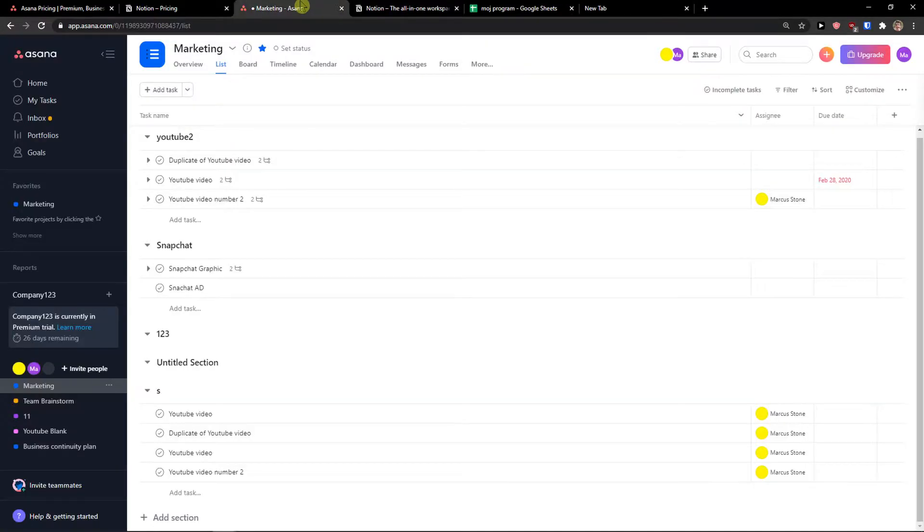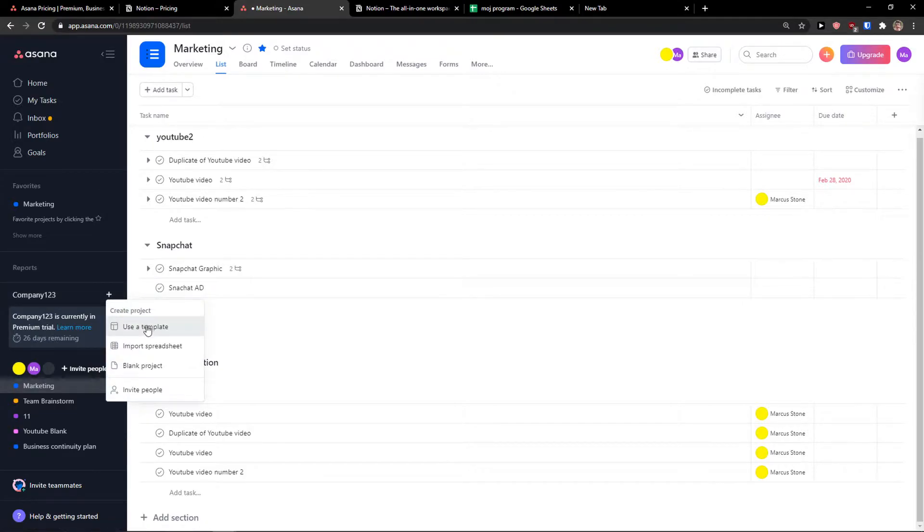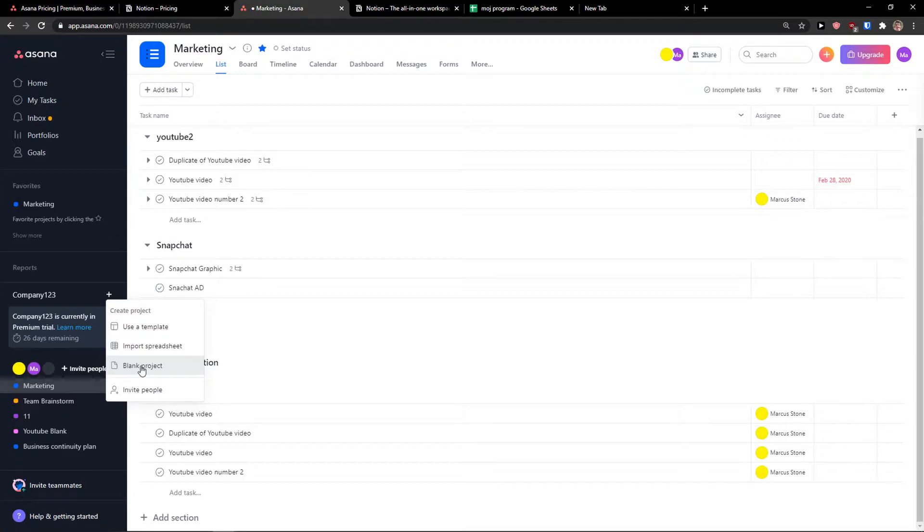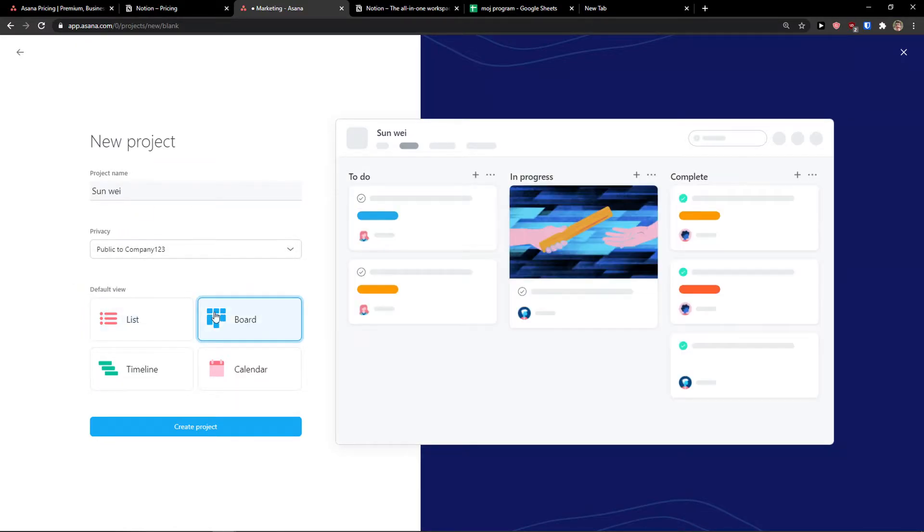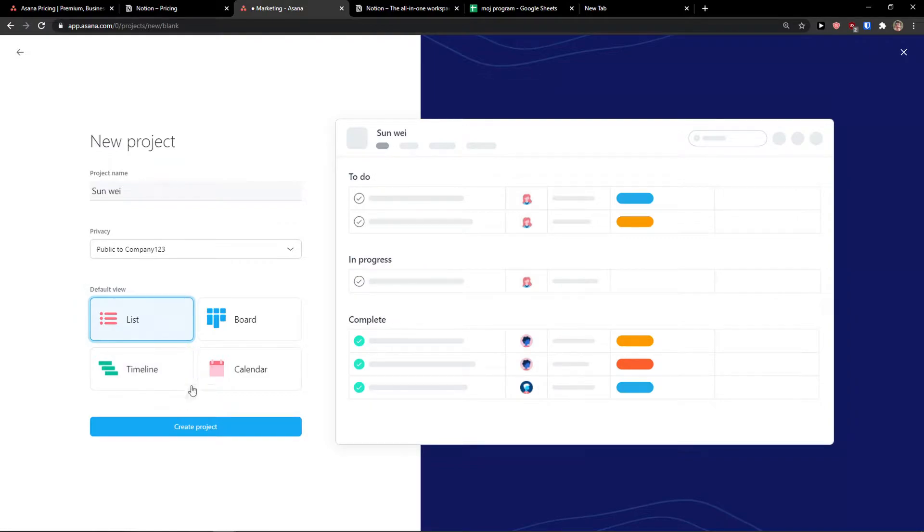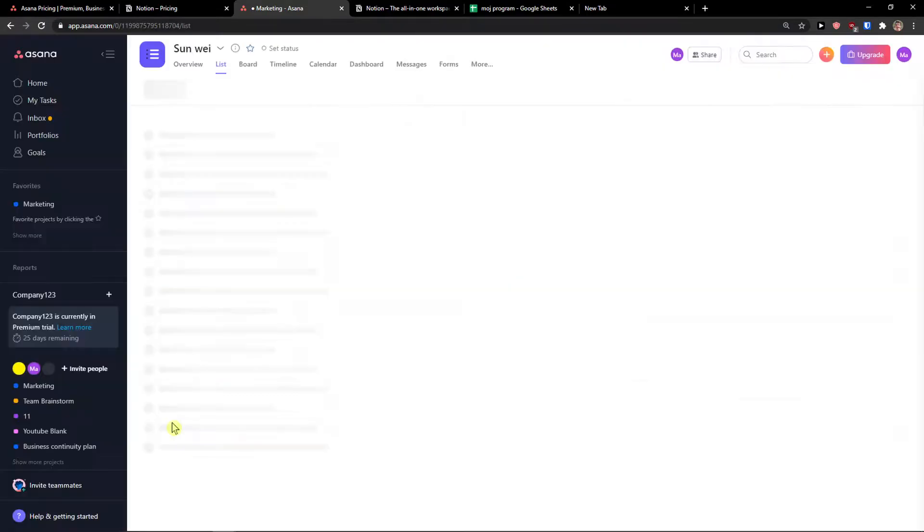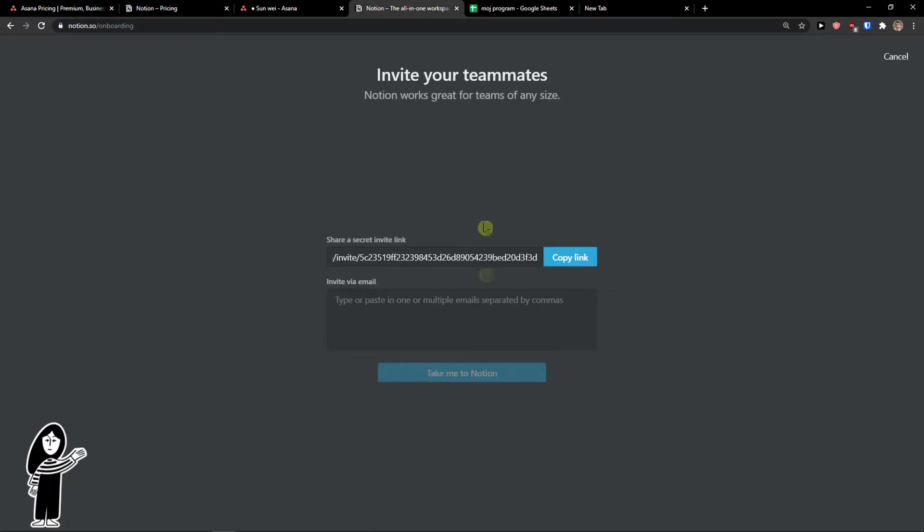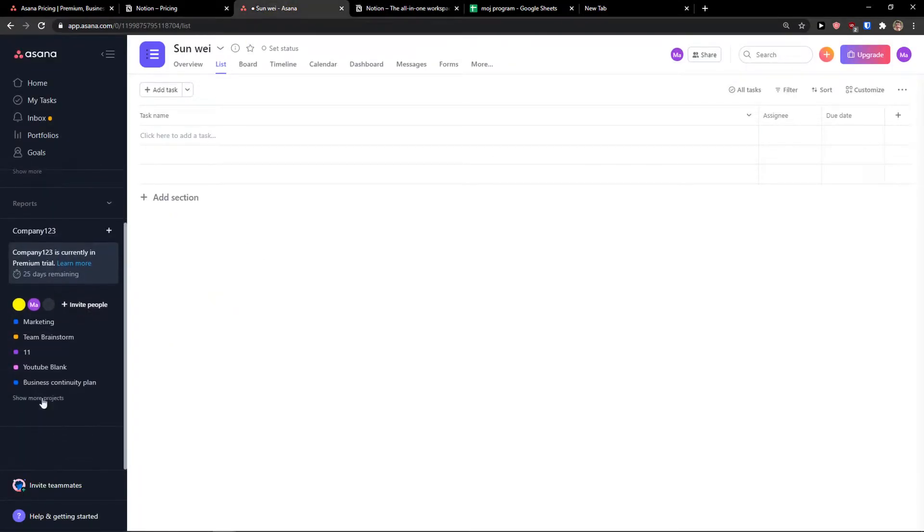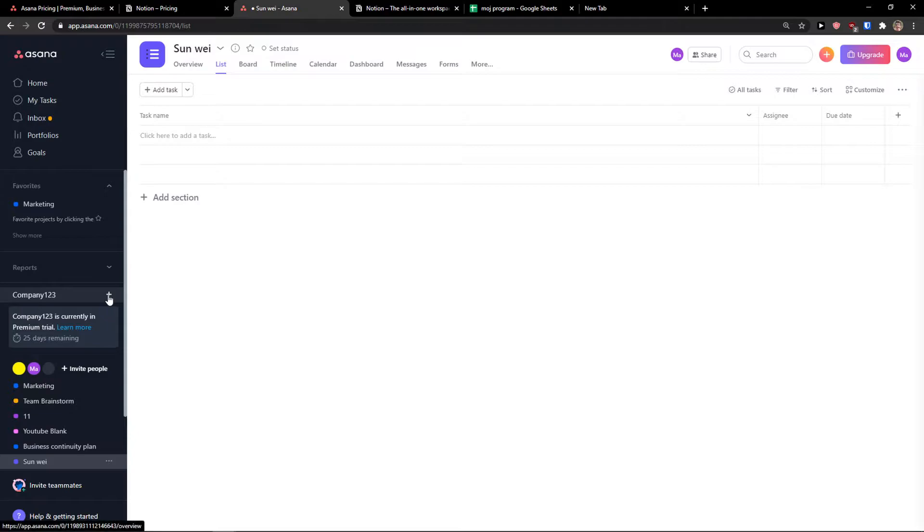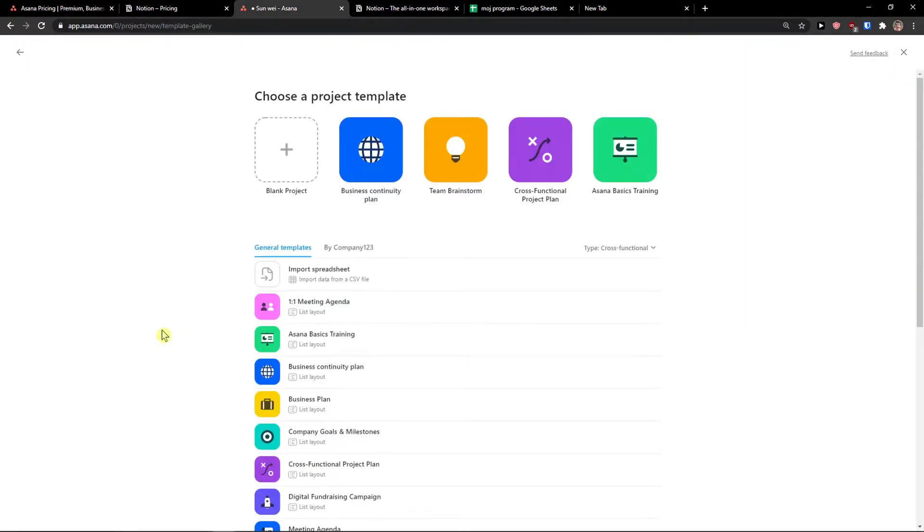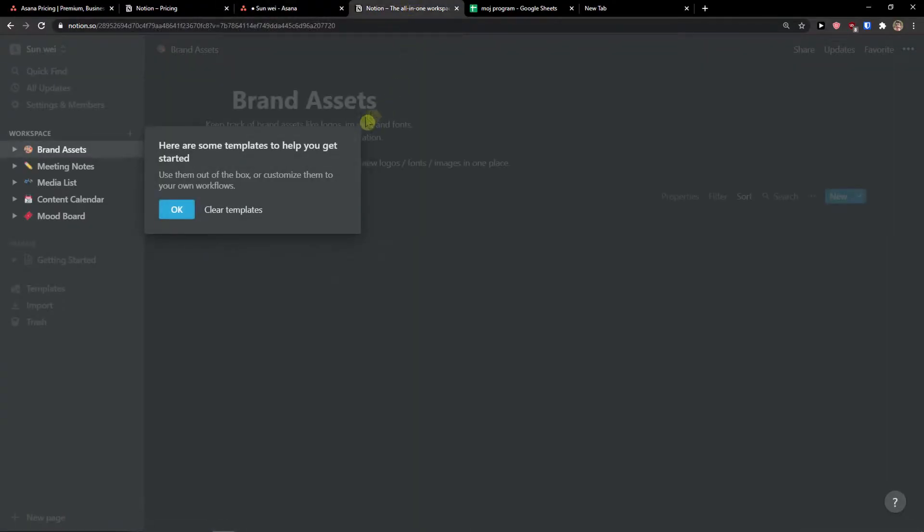While it's loading, in Asana it's a little bit similar. I have a company here, I click plus and can use a template, import a spreadsheet, or create a blank project. So blank project, project name can be public to company - list, board, calendar, timeline. I'll set list as default, create project. In Asana, as you can see, voila, really simple. Or you can just click plus, use a template, and choose which template you want.